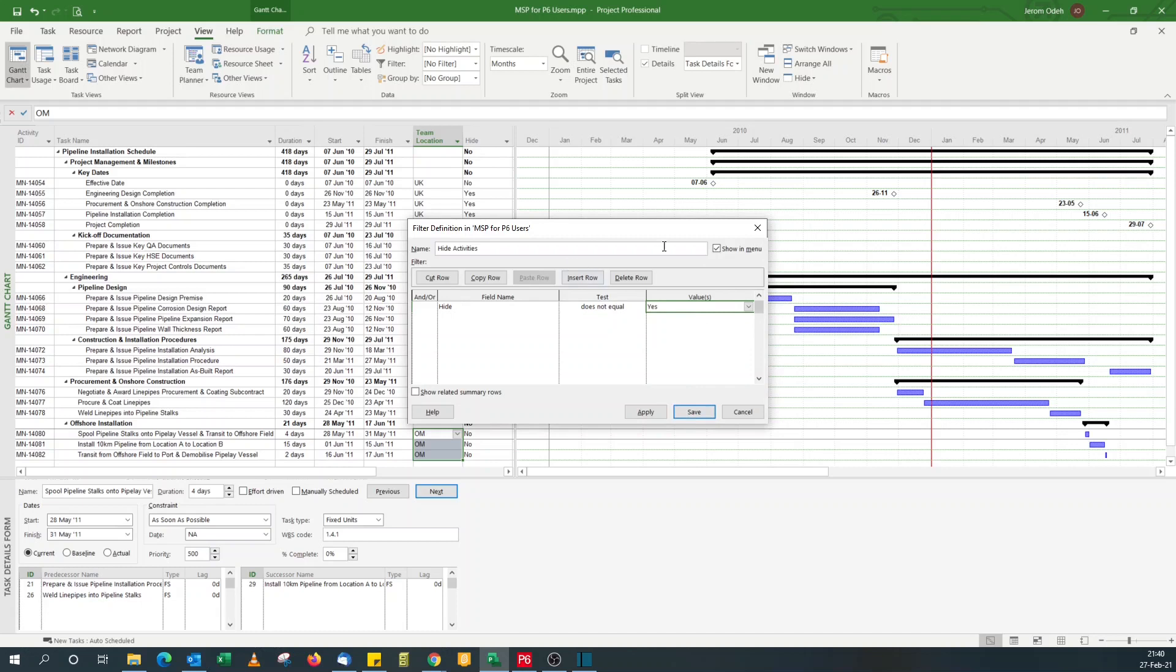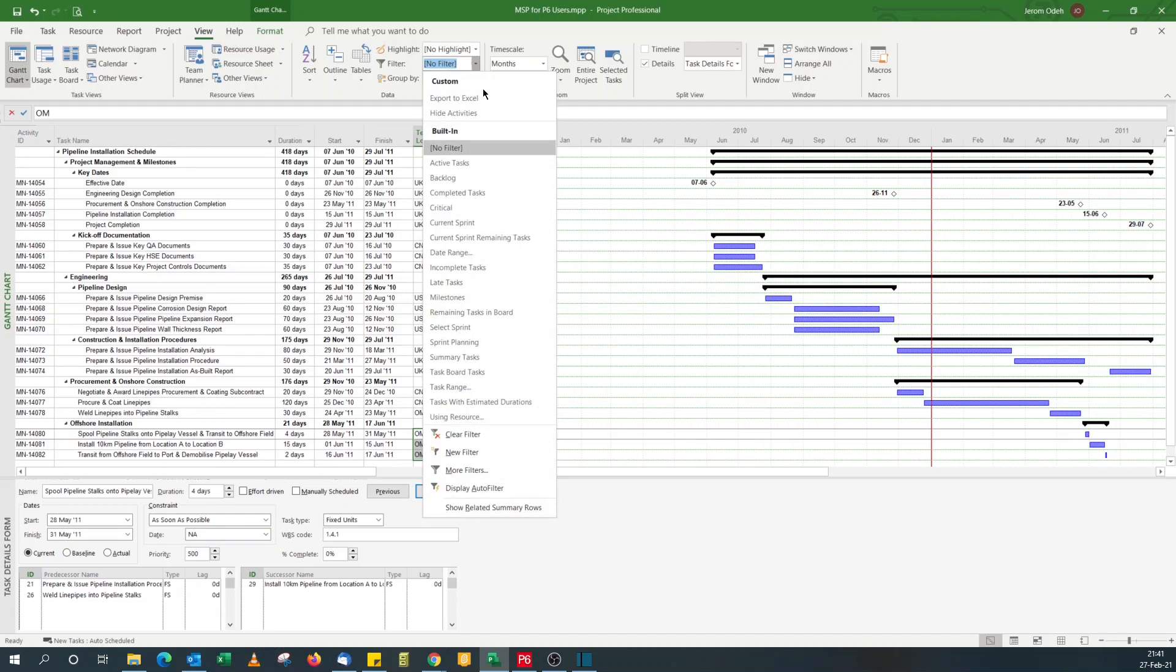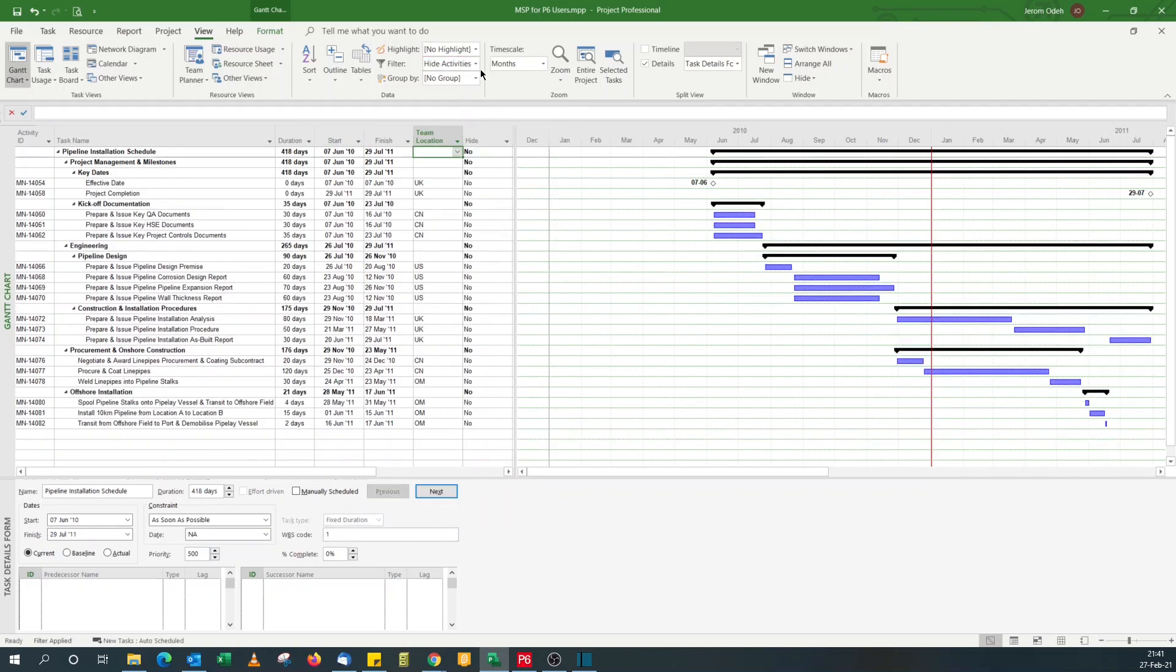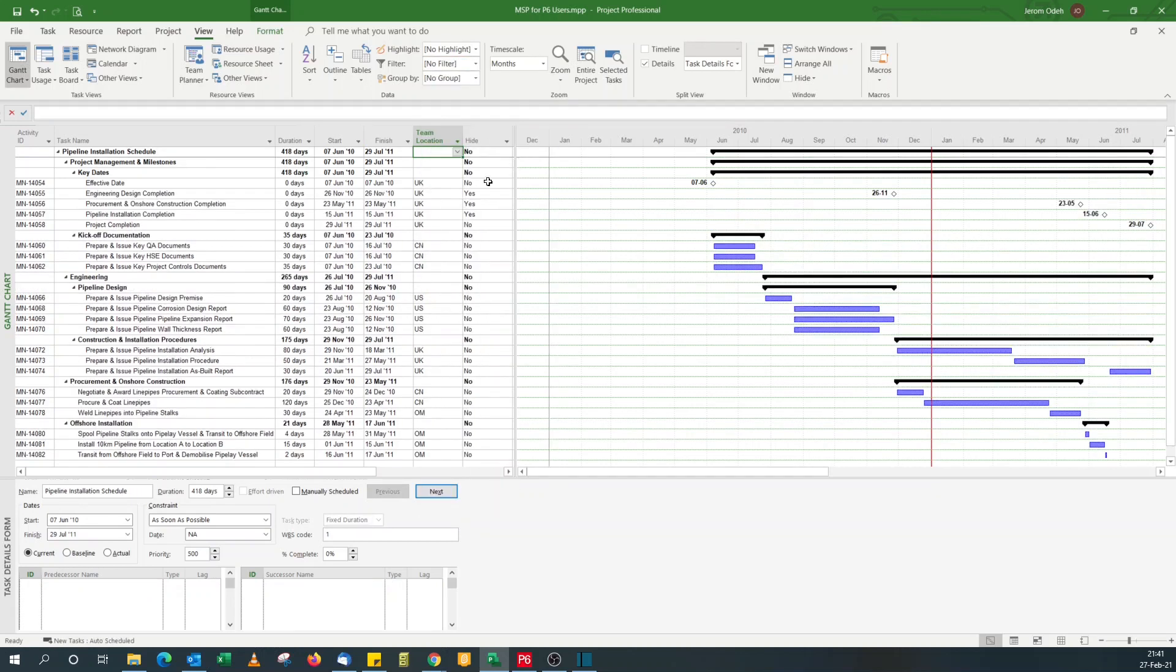When you create new filters, my advice would be to tick the show in menu checkbox so that it always appears. So I can save this. And then see, it appears now in the menu so I can pick this. You see those activities have been hidden. If I say no filter, they're back.